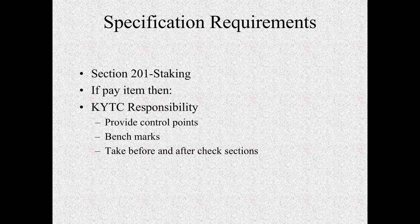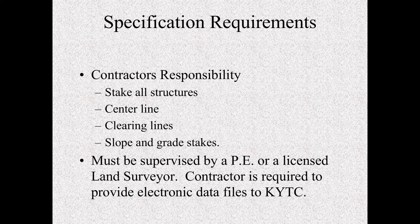Section 201 in the Kentucky 2019 spec book covers staking. This is generally a pay item. When it is a pay item, KYTC is responsible for providing control points and benchmarks. And then as inspection, we're taking before and after check stations if you have the equipment available. When it is a pay item, it is the contractor's responsibility.